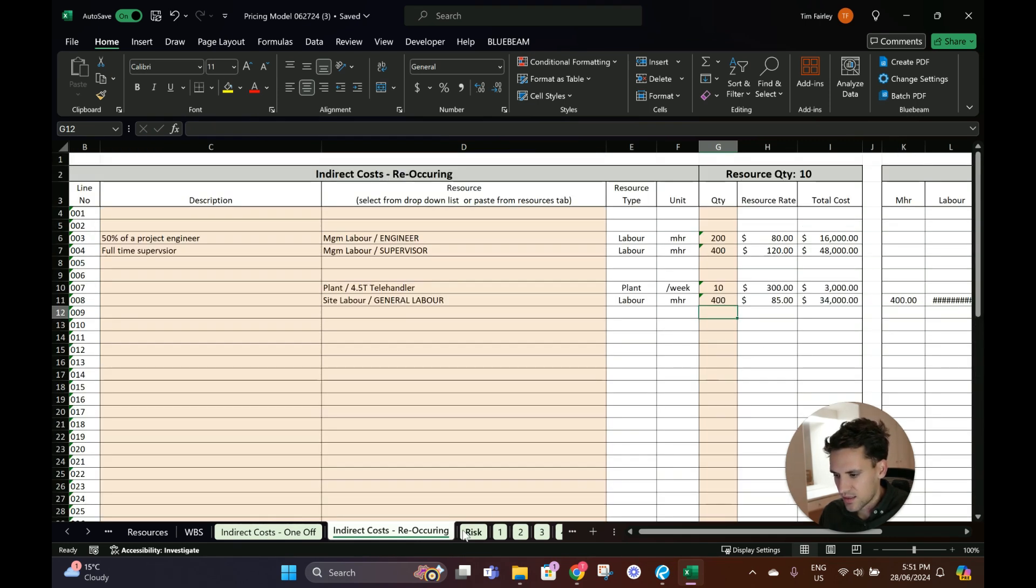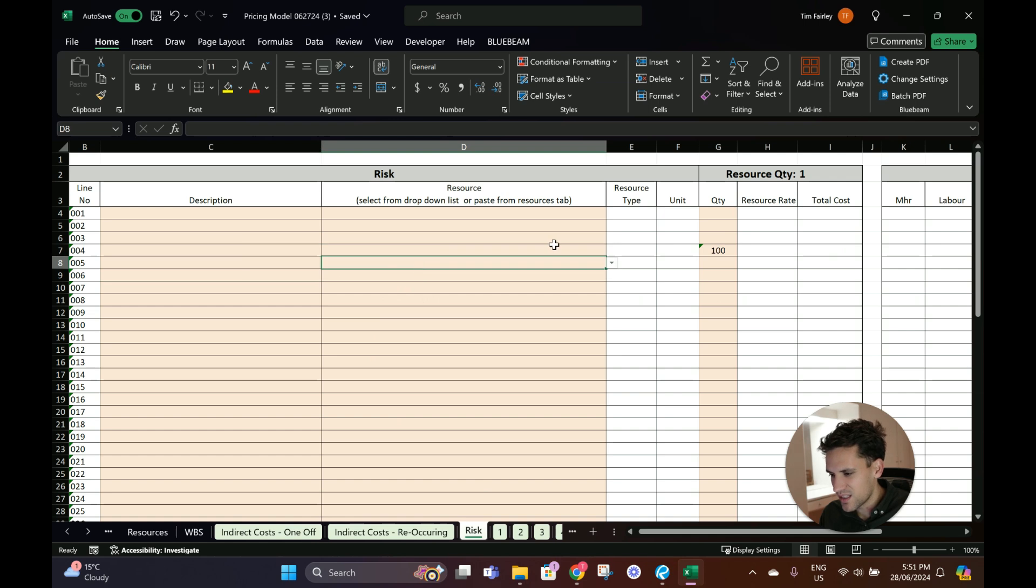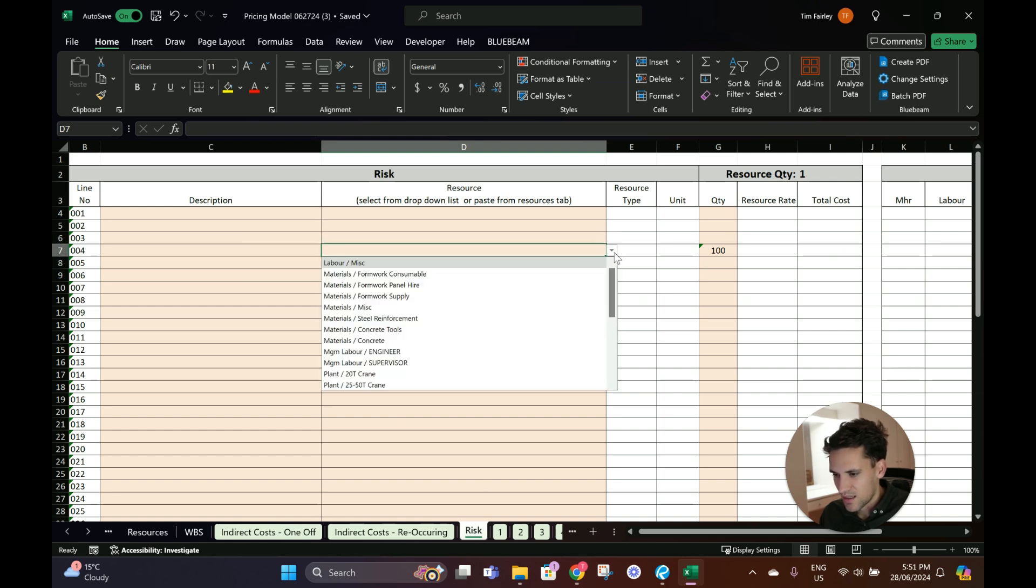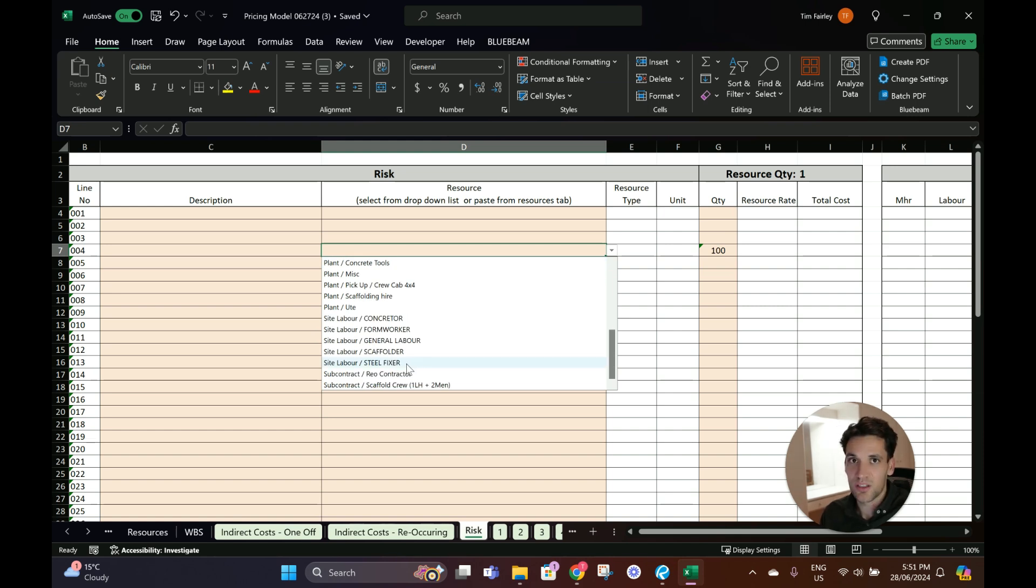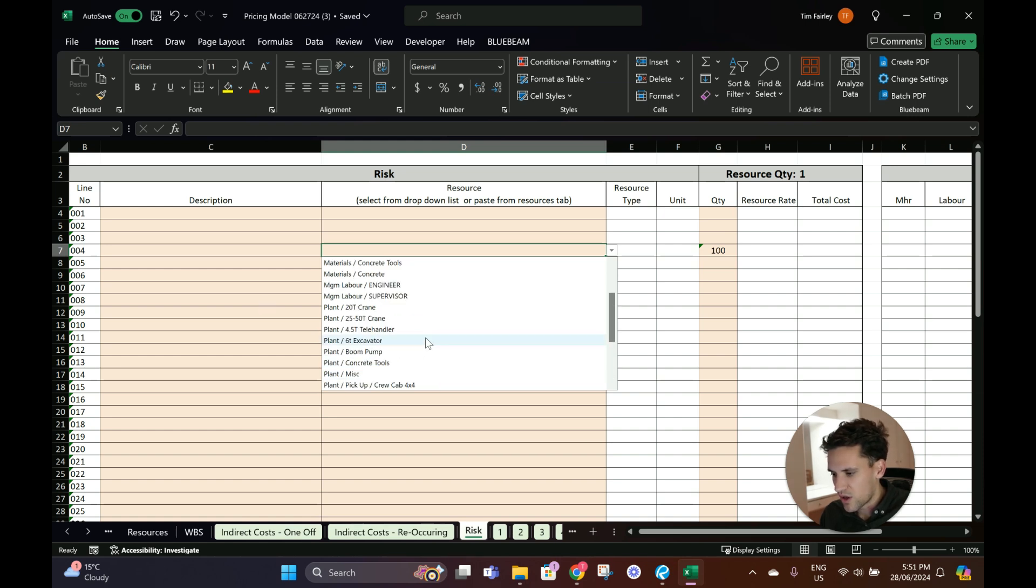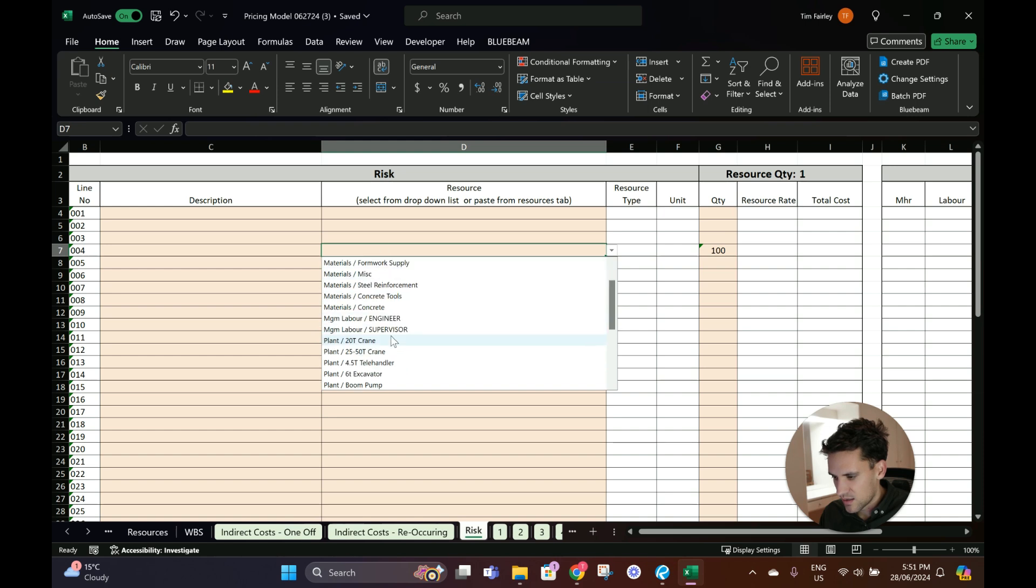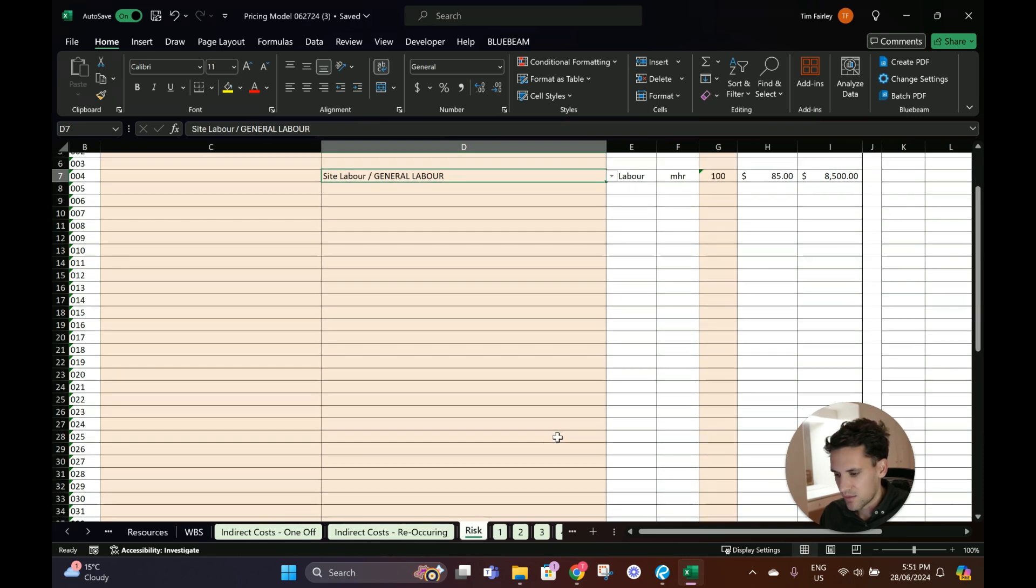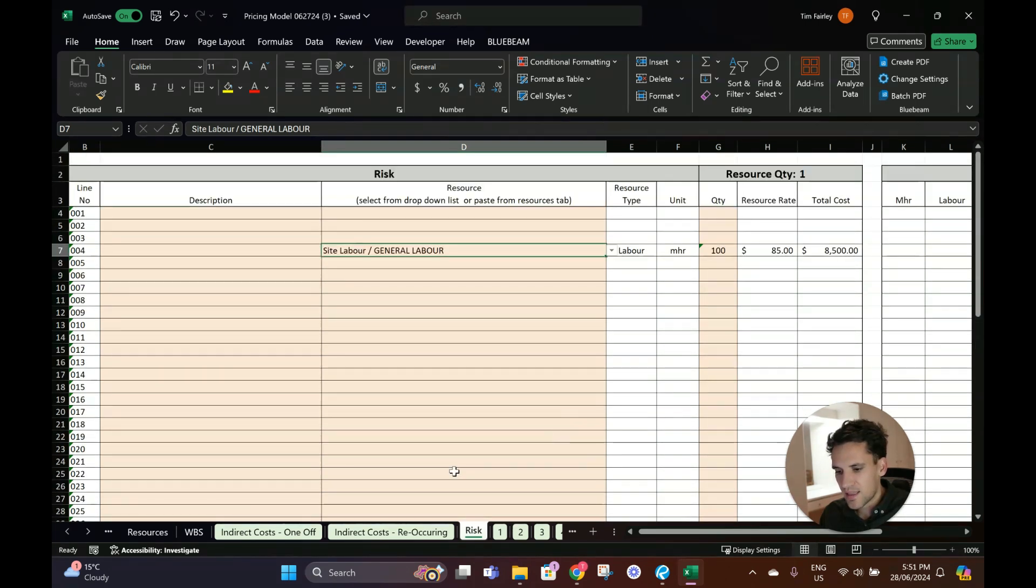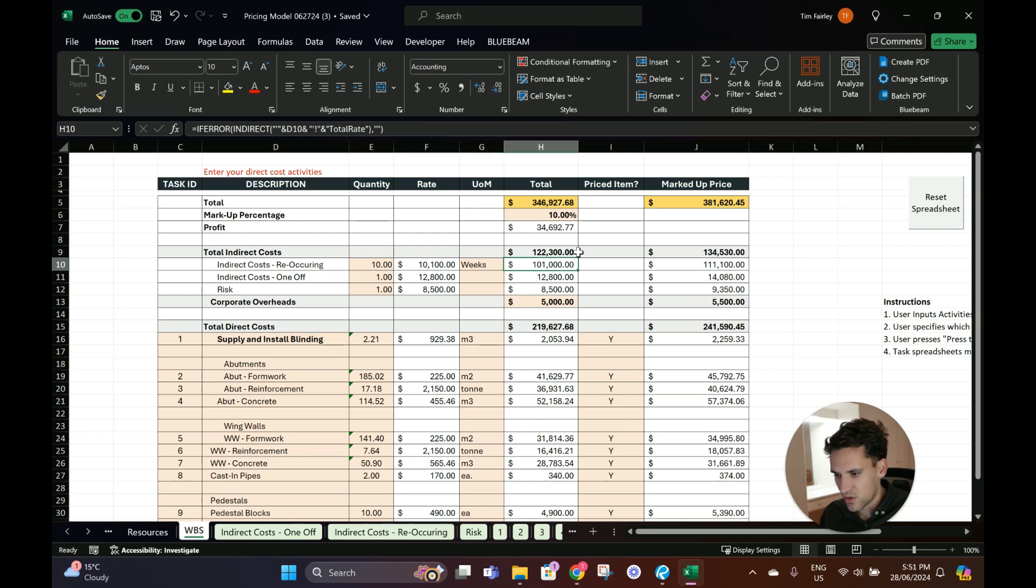Risk - maybe we just put in 100 man-hours. You can look at how much weather you're expecting, depends where the inclement weather risk is on you or the client's taking on that risk. We'll just put in site labor general, about 100 hours. Then we go back to the WBS and you can see our total indirect costs are $122,000.